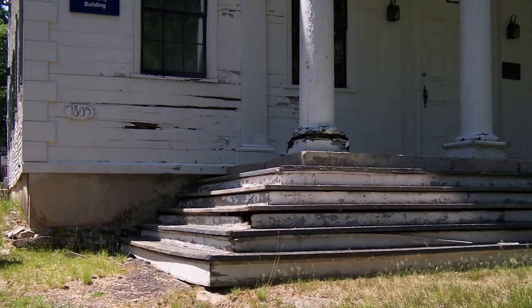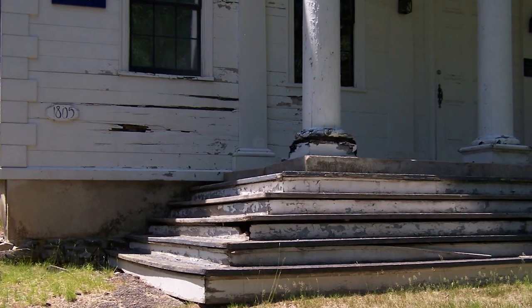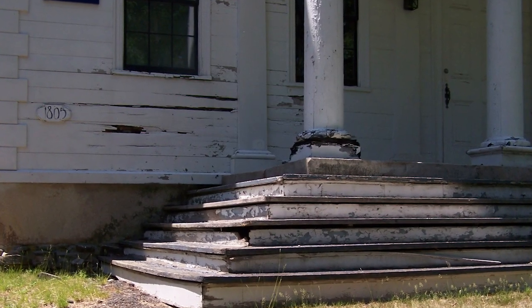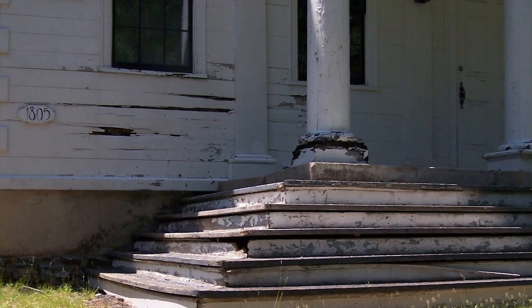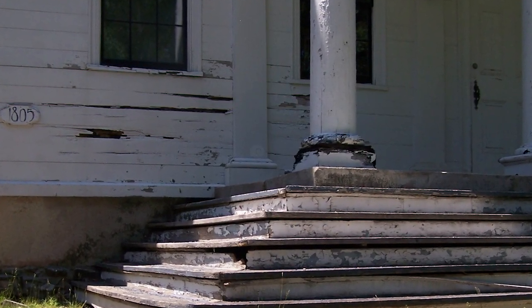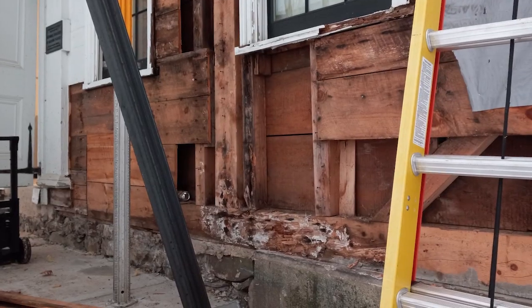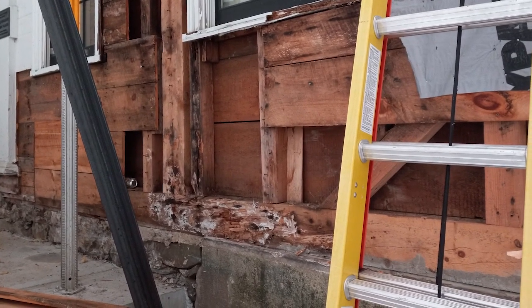The resulting Historic Structures Report detailed how the remarkably intact building would only need minor repairs to its side and rear elevations, while clear signs of water damage across the elaborate primary facade would require further examination once work commenced. With the siding removed, the team discovered extensive rot across the timber frame behind the facade.